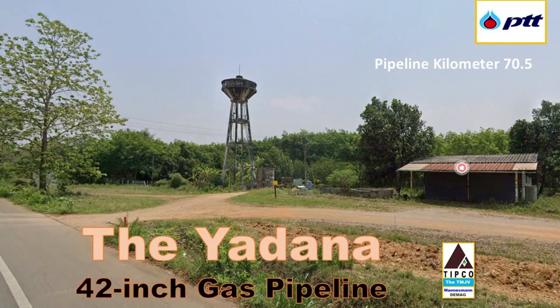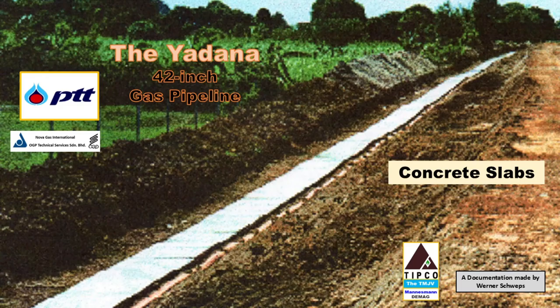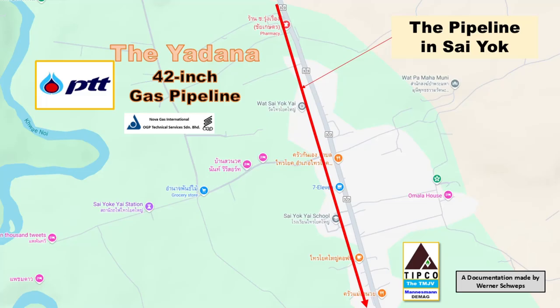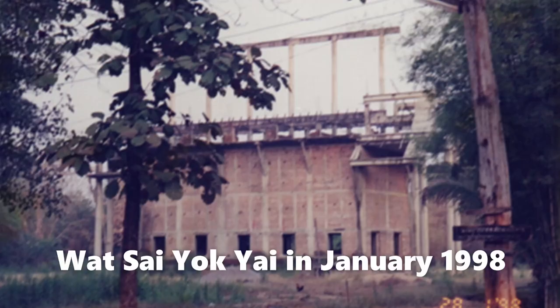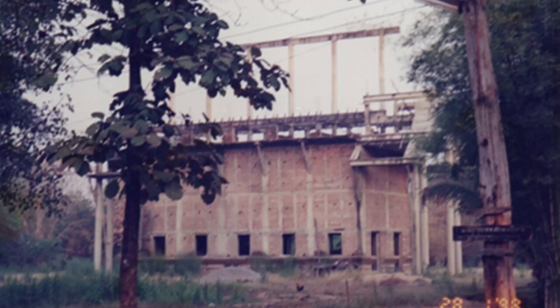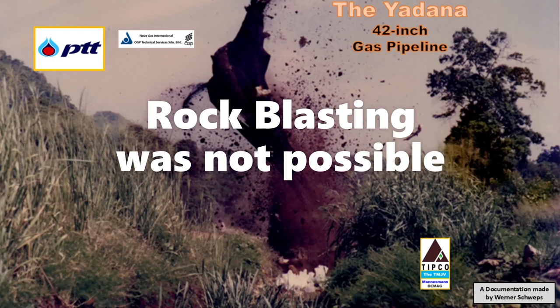Along the entire length of the highway, the buried pipeline is covered with a minimum of 1.5 meters of earth, and concrete slabs have been used as well to protect it. The pipeline runs parallel on the west side in the road corridor, passing a temple called Wat Sai Yok Jai after 500 meters. At that time when we built the pipeline, the big building of this temple was under construction. We encountered many complaints and stoppages due to the vibrations caused by our heavy excavators, rock hammers and dozers during rock removal in the ditch and surrounding area.